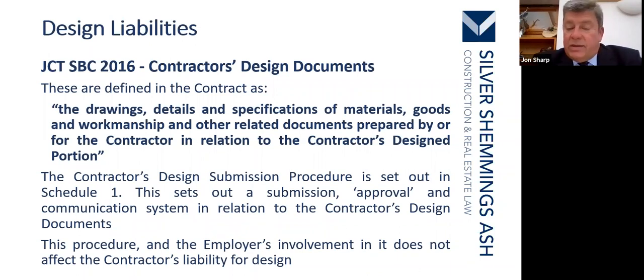JCT SPC 2016 contractor's design documents. These are defined in the contract as the drawings, details and specifications of materials, goods and workmanship and other related documents prepared by or for the contractor in relation to the contractor's design portion. The contractor's design submission procedure is set out in Schedule 1.